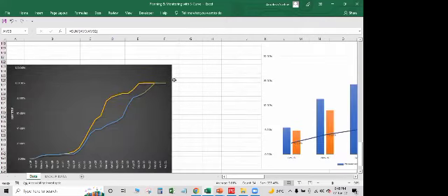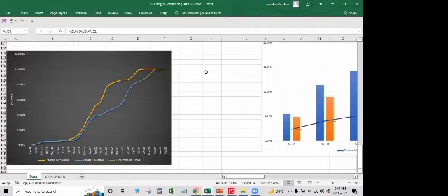right? अब अगर आप यहाँ पर देखोगे नीचे एस कर्व है, this curve shows the planned versus actual, and a very beautiful thing here, if you'll observe, there's another curve which is in green color, and this is giving you the expected progress, right? Expected progress दे रहा है आपको. ये जो yellow है वो आपको planned बता रहा है हर month का, and this blue one is telling you the actual which you have achieved. And since we are at this stage of the project, तो इसके बाद जो भी green line है वो आपको expected progress दे रहा है.